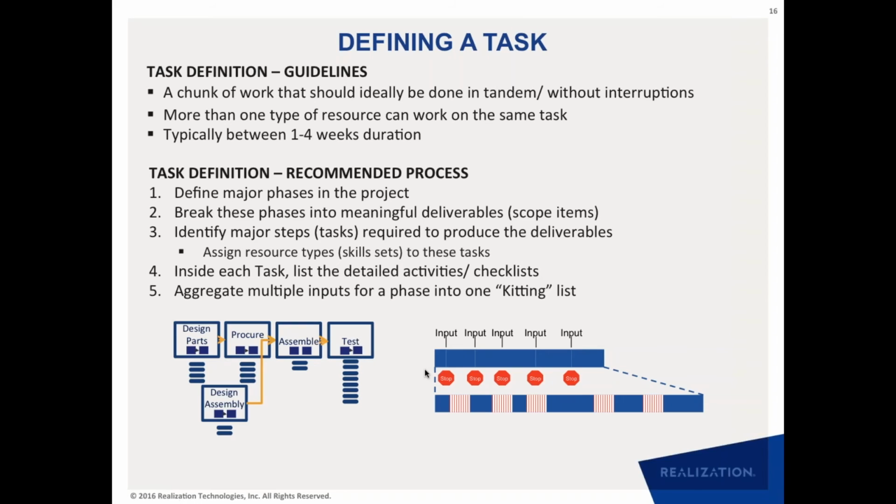So again, as I said in the beginning, the concept is very simple in terms of what we are recommending. All we are saying is, yes, you can capture all the details that you want inside a project plan, but do not capture those details to manage schedules. You can capture those details to help out the local team leads, but the information that is flowing into the critical path of the project, that level of plan, which is the tier 1 plan, should be very simple.